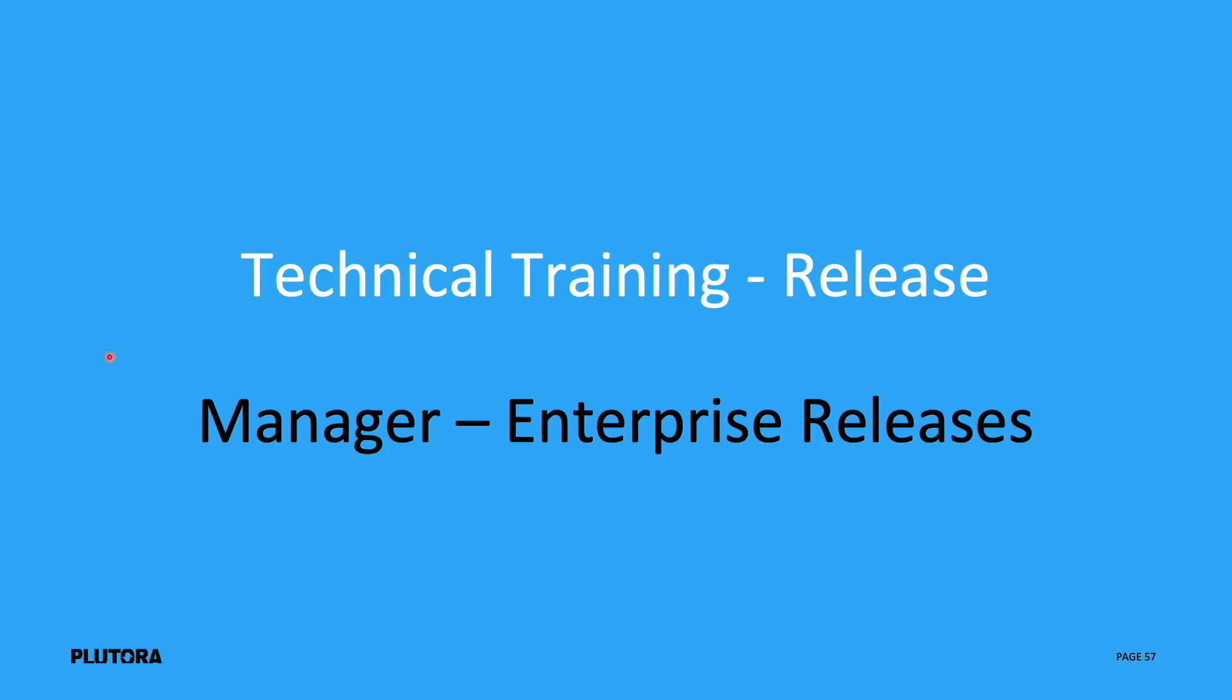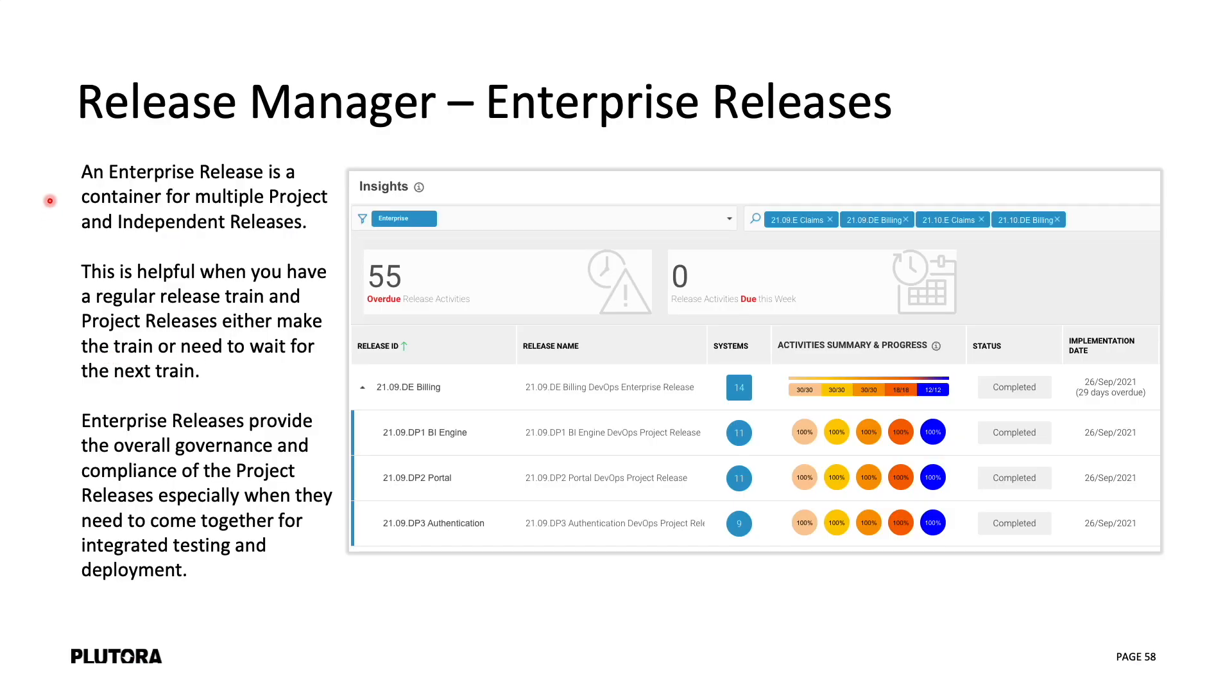In this module we're going to go over enterprise releases. An enterprise release is a container for multiple project and independent releases. This is useful when you have a regular release train and project releases either make the train or they have to wait for the next train.